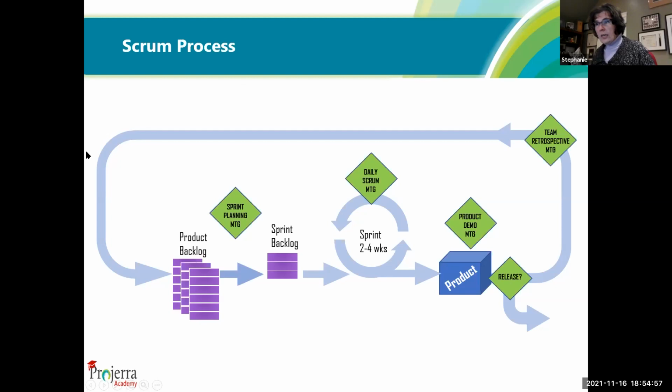So then they come back here and then they have more time to figure out what the backlog is now, and they're going to take a couple items off the backlog here, and then they begin implementing according to the new process, and they do their sprint cycle again for another 2 to 4 weeks and do their demo. The client says, yeah, I like it, let's ship it out. That's good. They have a release, they do a retrospective, and they say, okay, well, we've done our sprint release number 2 here, let's continue on with the backlog, and it becomes a cycle.